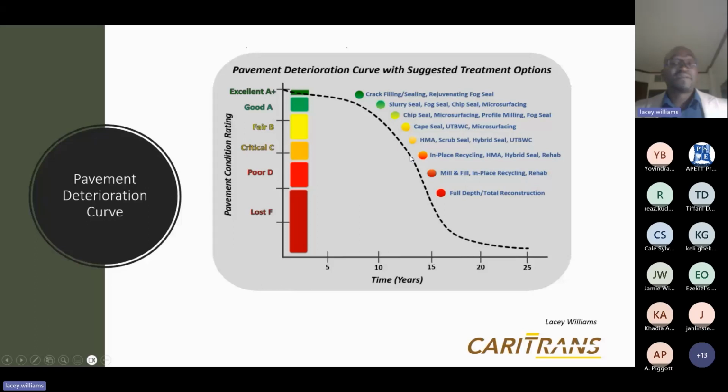I've seen the pictures before the design stage where the condition of the roadway was markedly different at the award of construction compared to when the initial problem had surfaced. And as such, what you find then is that you have variations, you have redesign, change orders, you have increased cost naturally, you have increased time for the project.